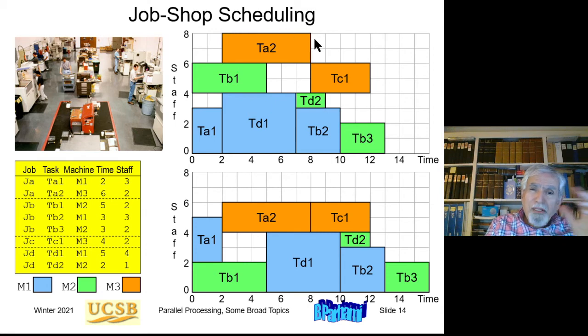And then the manager should put these pieces next to each other like a puzzle in order to achieve some goal. So the goal is basically finish all these tasks in the shortest amount of time. Okay? But of course, the time itself is not the only important criterion. How many people you're using, in this case 8, is also important, because if you use 8 people versus 6 people in the second schedule,